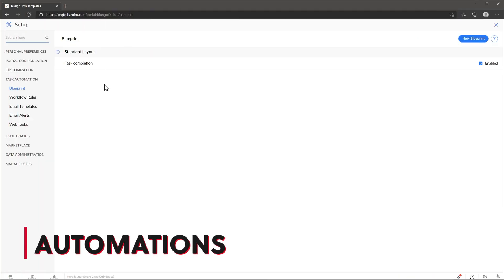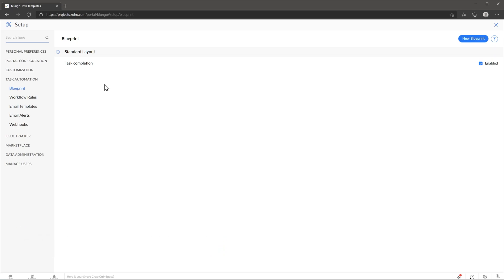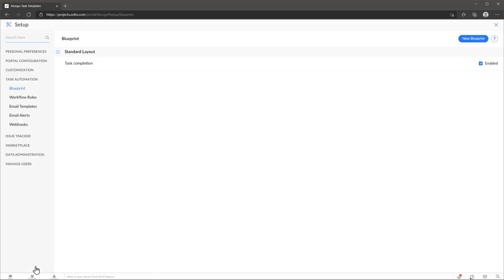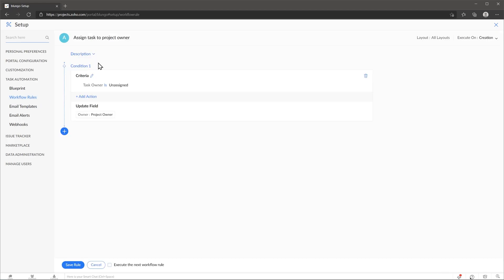Regarding automations, there are a few things we can do in Zoho Projects. Blueprints allow you to create a workflow for your tasks, so the process followed to complete a task is always the same. You can also update fields and send email alerts automatically. With workflow rules, you can set a criteria and automatically make changes to your tasks based on the criteria. For example, every time you create a task, you can assign it automatically to the project owner.